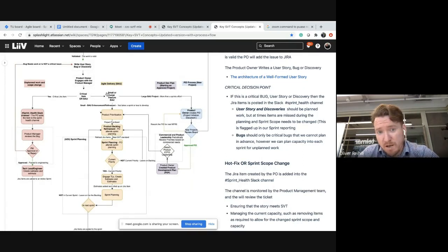So as we saw earlier, when we talked about small projects, they would fit around larger projects. These larger projects would be prioritized by both the commercial and the product team, allowing all the teams to focus on what our goals for delivery are. And it would follow the same factory process prioritization. In the backlog, we would refine the backlog, prioritize items, ensure items are estimated, and then we go into sprint planning, where items will be accepted into a sprint. And each time we've got these quality gates, and we're checking progress or checking the priority for each of these items.